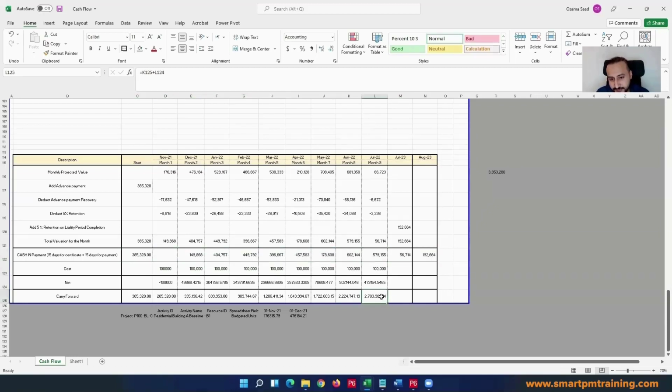So for example, maybe this will be profit, right? But of course it's not realistic, because I have the costs assumed here. But what remains at the end of the project, even after DLP, is your profit after the costs and what you get cash in from your bank account. So this will be your profit, but this is how it's accumulated over time. It starts with advance payment minus any costs plus any earnings, cumulative. So this is a cash flow. I hope it's clear.